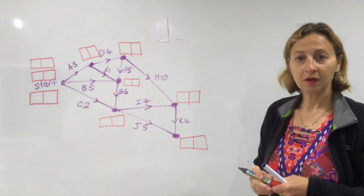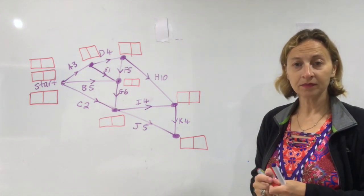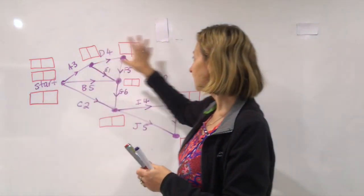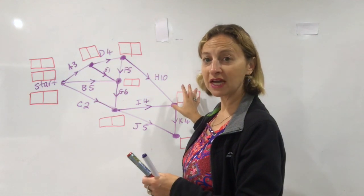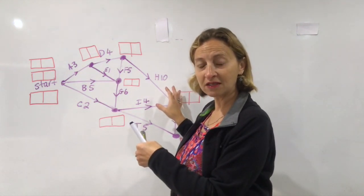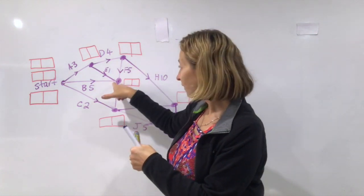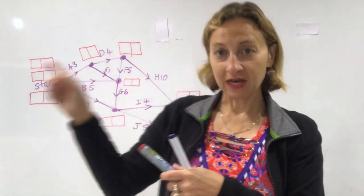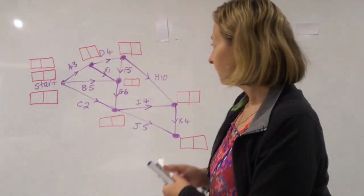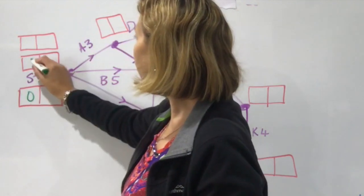I have all my boxes ready. Now I can do forward scanning and then backward scanning. Remember, forward scanning goes from left to right. I need to write down all the options going into that vertex, then look for the biggest number. Left to right is getting bigger, and right to left is getting smaller. Let's get started at zero zero.